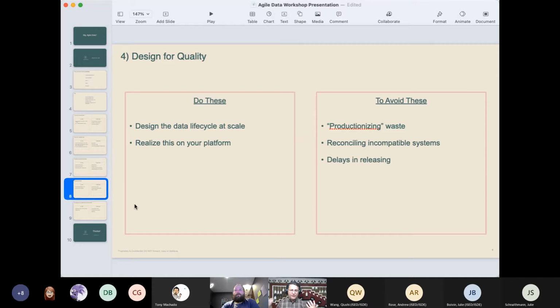If you're going to have to integrate with your platform, if there are tools that you're going to have to integrate with, don't delay that. Do it up front. Maybe you suppress those features. Maybe you comment out the code for now, but it's there. And when you're testing it, it works. And again, this is going to help you avoid productionizing, which is just rework, it's waste.